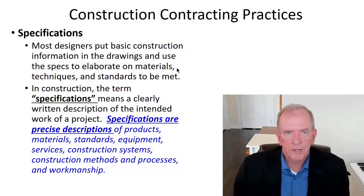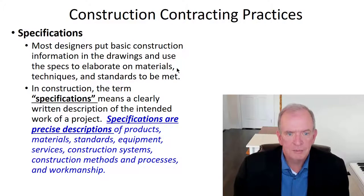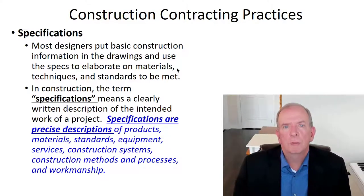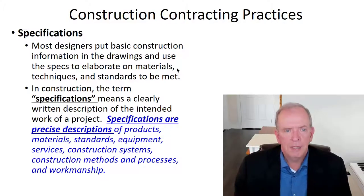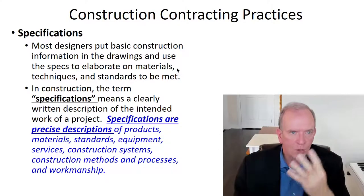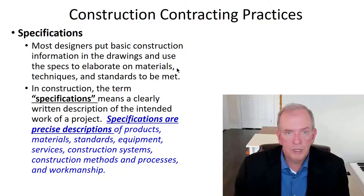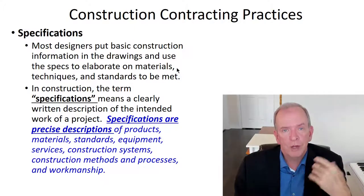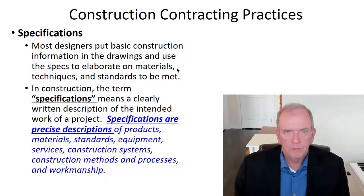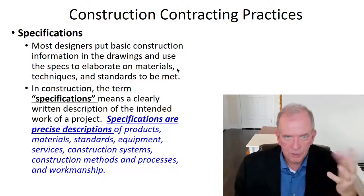For specifications, we use standard specifications known as master format specifications — the old 16-division format and the newer 49-division format (divisions 0 through 49). These standardized specifications give very precise descriptions of products. A good example: a government agency wants to replace all the windows in one of their government buildings. They would typically specify maybe three or four approved window manufacturers that they've vetted and tested to a certain standard, and they'll usually say 'or approved equal' — so if the contractor wants another supplier that meets the requirements, that could be approved later on.